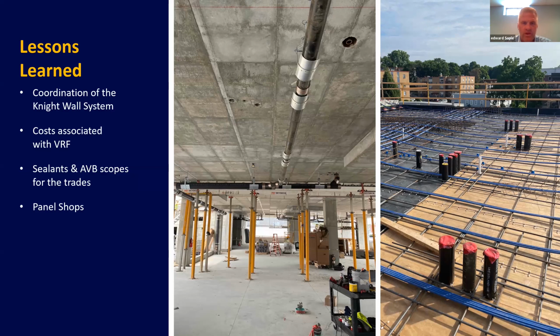He was part of the pre-construction. He's going to be part of all the mock-ups. He's going to be part of all the lessons learned. He has to go around and make sure all the sealant is done, not the drywall sub, not the insulation sub. We have a sealant sub on board, which I think is going to be a big benefit to us.